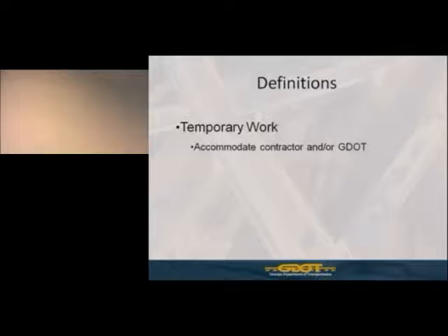And of course, temporary work to accommodate the contractor or the department. Now keep in mind, this is different than temporary work requested of you maybe by the contractor at a later date once the project has been awarded and the contractor has taken over the project, whether by him or the department. Because if you recall, I mentioned earlier, you're submitting this utility adjustment schedule well in advance of a letting of a project, and certainly before award of a project. So this is for if you need to do some particular utility sequence of operation or staging on your own, or whether requested by the department.